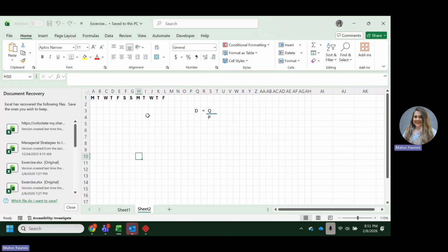So how do we calculate durations? Duration equals quantity over production rate. If you have a specific quantity for a specific material, you divide that by the production rate and you get how many working days. So that duration is in working days. Let's say the duration that we got is equal to 3 working days.